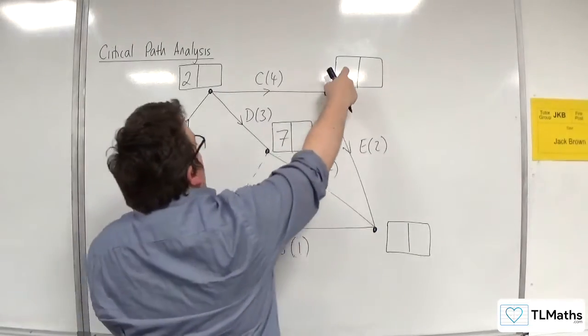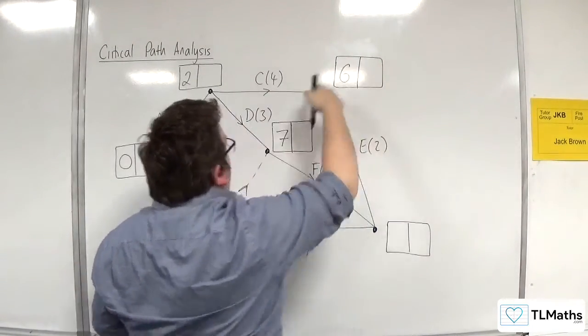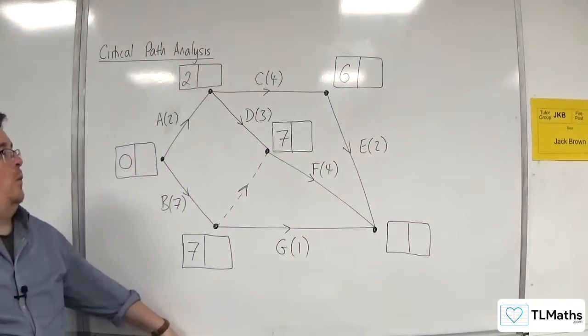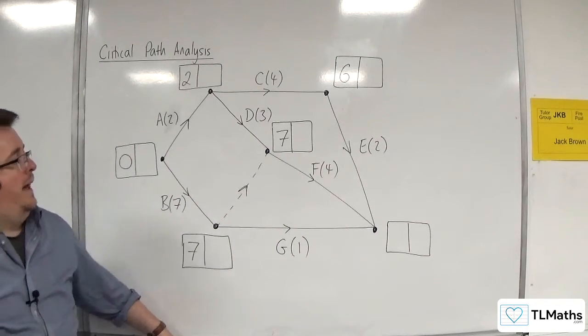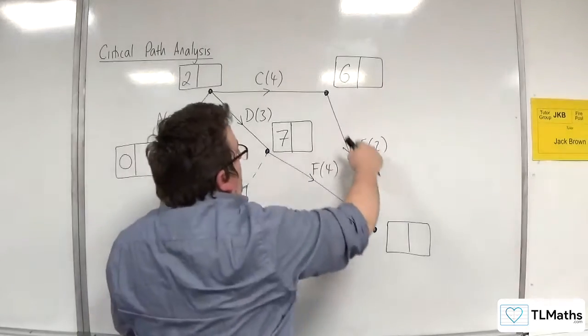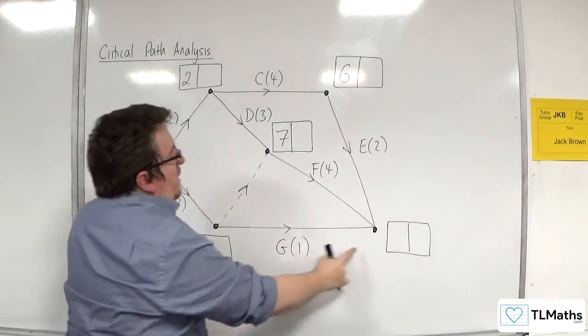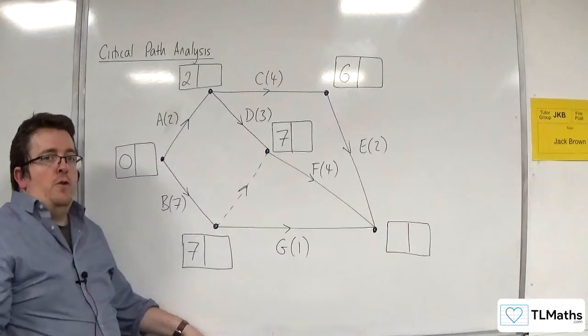So how about this one up here? Well, I've got two plus four, so six. That's the only arrow going in there, so I only need to consider that one route. And now for our final box here. We've got six plus two is eight. Seven plus four is 11. Or seven plus one is eight. So it's either eight or 11.